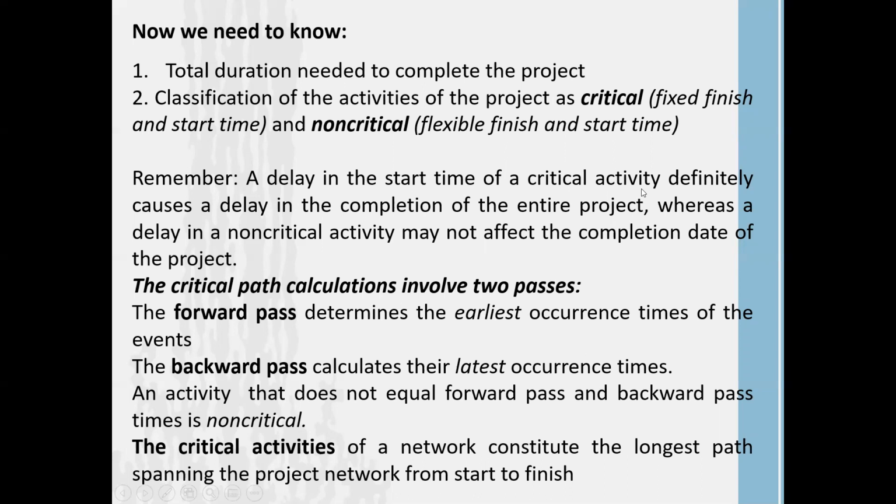Delay in the start time of a critical activity, that means an activity which has fixed starting and finishing time, if we unfortunately delay the start of those activities, definitely it causes a delay in completion of the entire project, right? For example, take your academic 4 year period as a network. If you make any delay in one semester or one academic year, then definitely the completion of your degree program is going to be affected, right? So think about it like that.